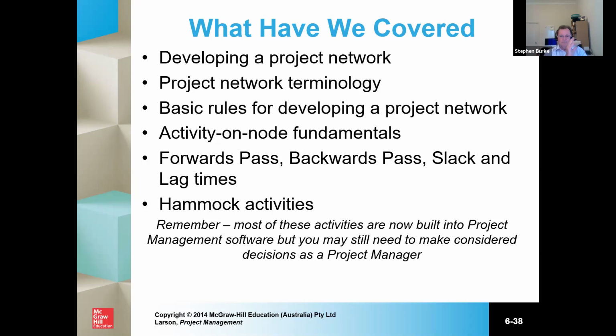HMS Pinafore. We looked at developing a forward pass, backwards pass, how soon can we finish, how late can we start, where you get slack and where you get lag times. If you're trying to condense a project down, you start to look at the slack. Some things you can't change, like lag. Lags are generally agreed to be outside of your control as a project manager. But this is where you start to exercise your ability as a contract negotiator, or building on the relationships with external third parties to your project to reduce lags as much as possible, which means you can recast your project.